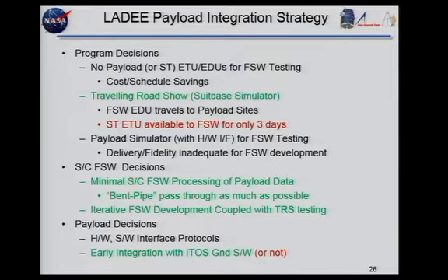I think there was one case of that, and it turned out to be fine, but I think there were people working extra long hours because when you're on INT, that's costing money. If you have 2 days to do something, you want to finish it in those 2 days. Otherwise, each day is costing 30 engineers, however much that costs if you're in the critical path. So it turned out to be okay, but I think it caused more stress than if we could have integrated that earlier.